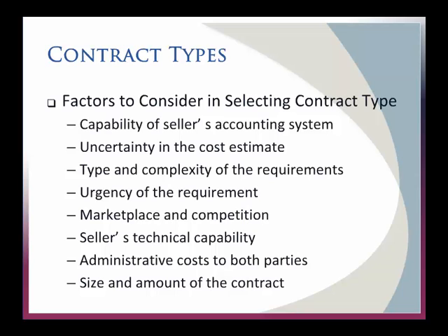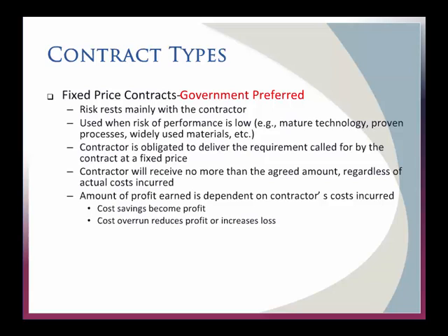to put in place. So you should know that the type of contract that the government likes is fixed price contracts. The reason they like them is that they're extremely predictable. There's an argument for why we shouldn't even say that the government prefers these, because they might force you to do a fixed price contract when, like we just talked about, the cost estimate is such a SWAG you don't know what it's really going to cost.